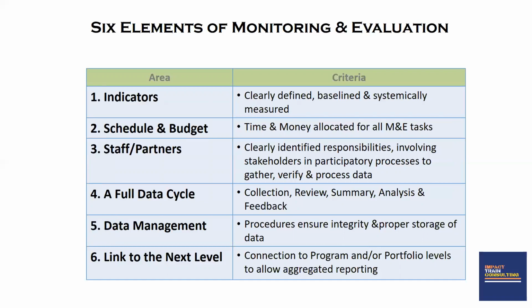As much as possible, clearly identify responsibilities for everyone who is working on that project. And always maintain a full data cycle that starts with collection and ends with feedback. So you would have collection, you would have the data review, you have the data summary, data analysis, and feedback on the data. And when you've collected your data, it's important to think about how you want to store this data. As much as possible, you need to ensure that the data is stored properly and it still has integrity.